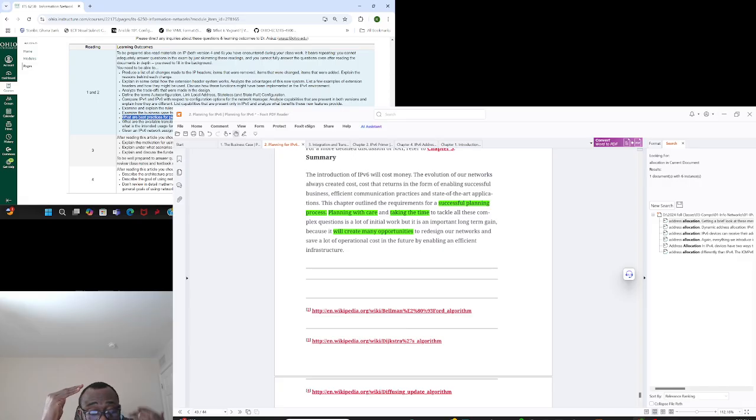After you've evaluated, you follow the existing change management processes in your company. You want to do a detailed health check on your current IPv4 infrastructure. We want to look at the health state. You don't want to build an IPv6 network on a network that is not healthy or that has issues. So you want to fix your issues. You want to do a detailed health check.